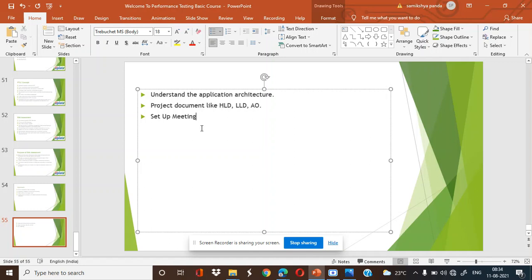Normally it is done in the planning phase of the project, but practically there are many challenges, like a change in project scope during the initial or development phase, or a change in strategy, which make the initial risk assessment very tough. Hence, performance testing risk assessment is conducted either at the end of the development cycle or when functional testing starts.